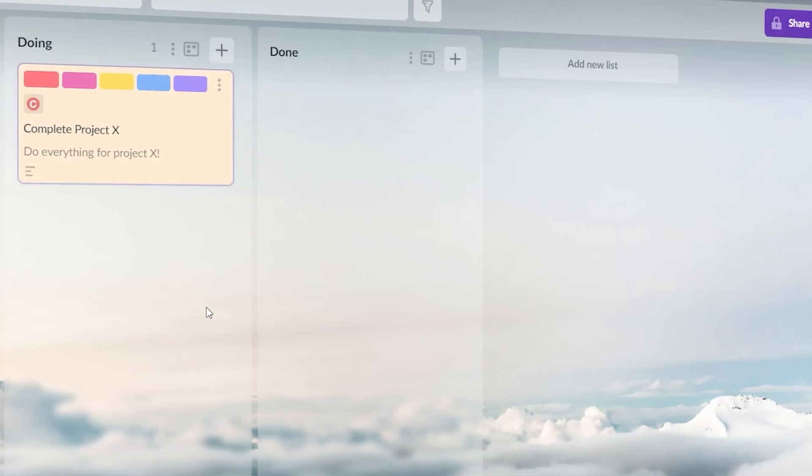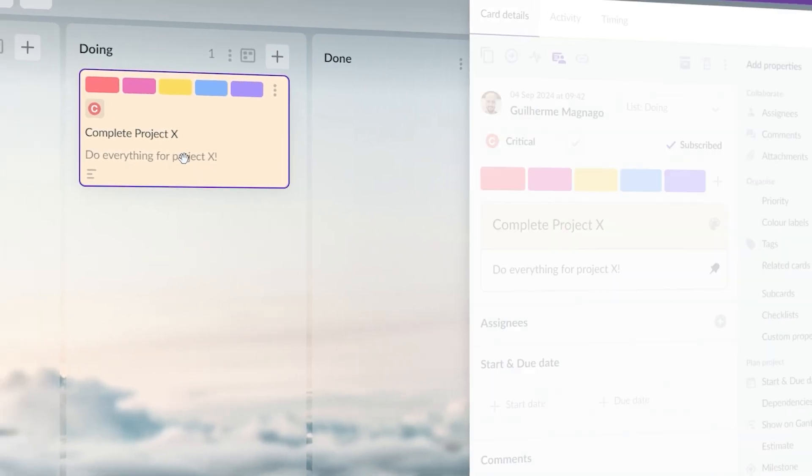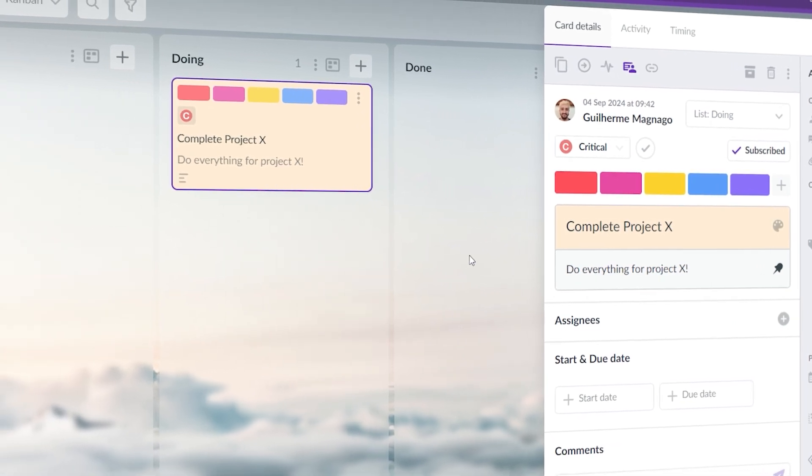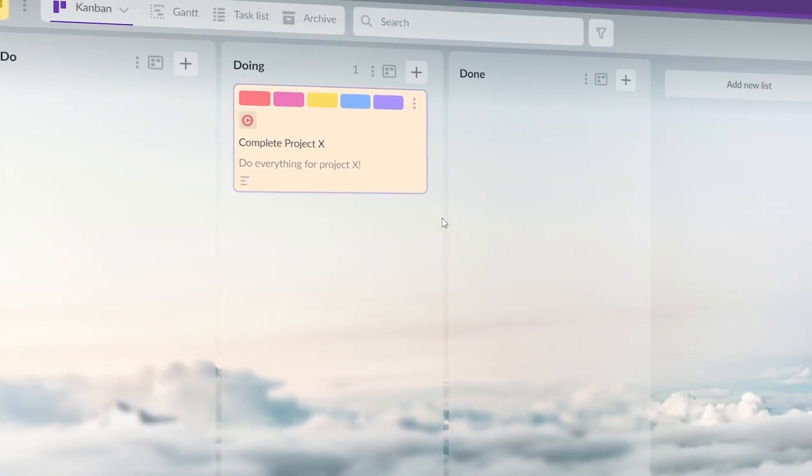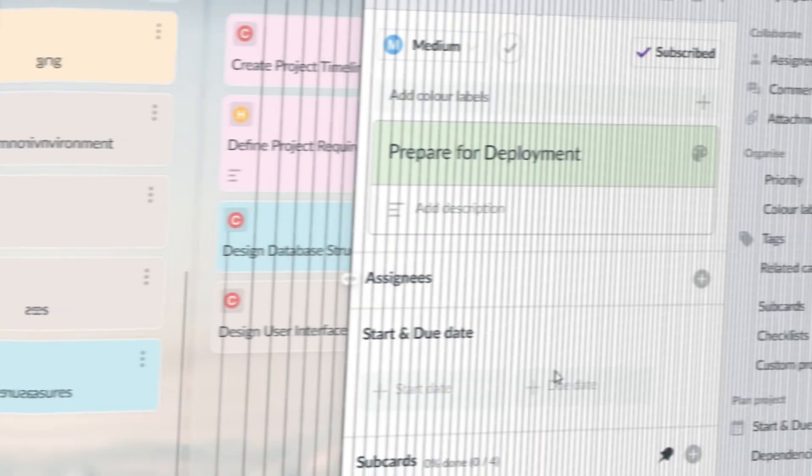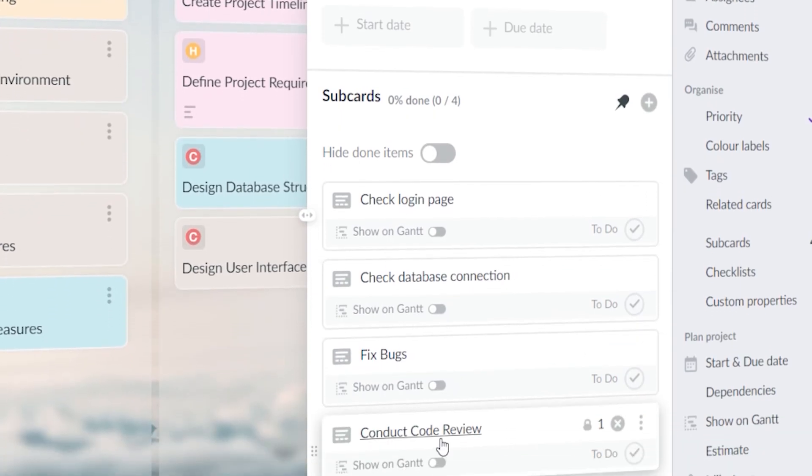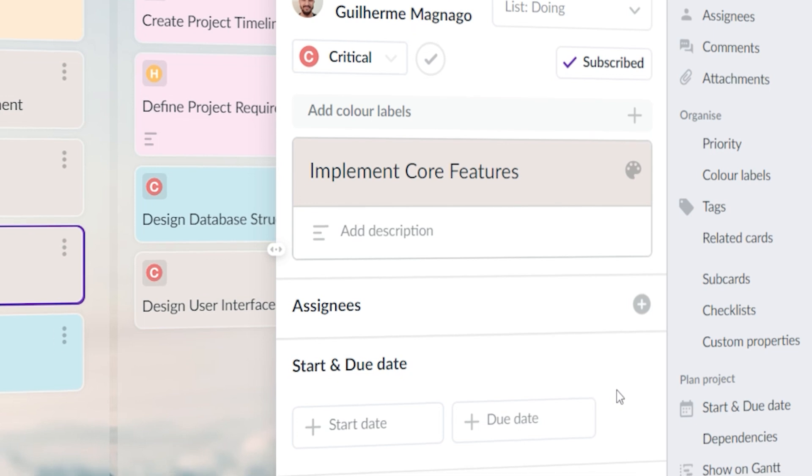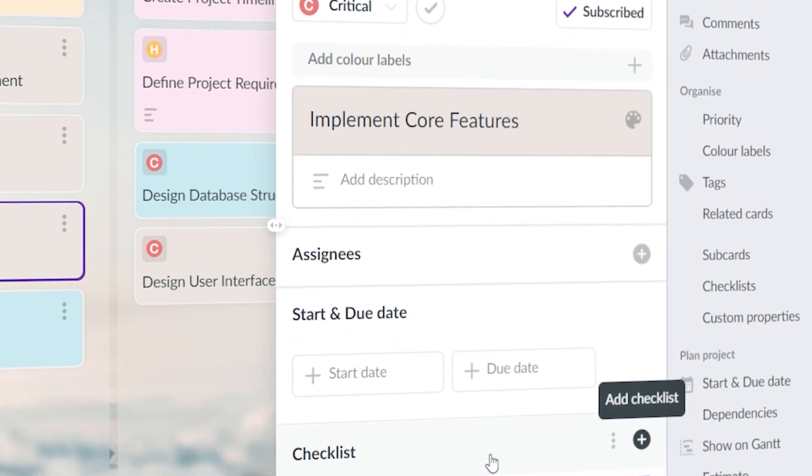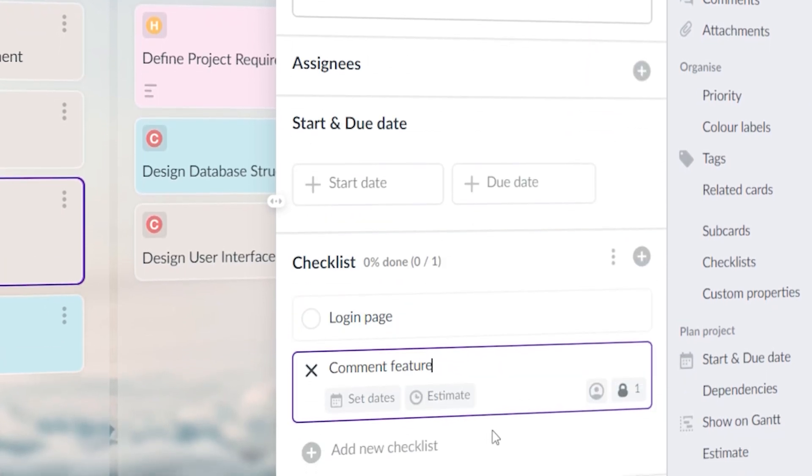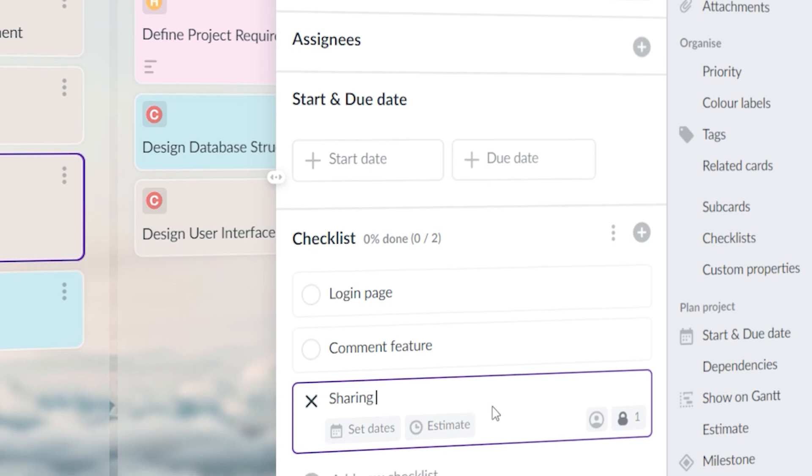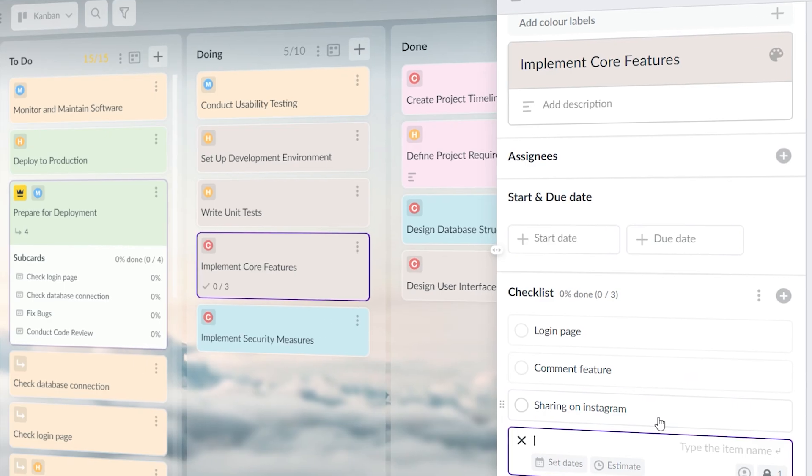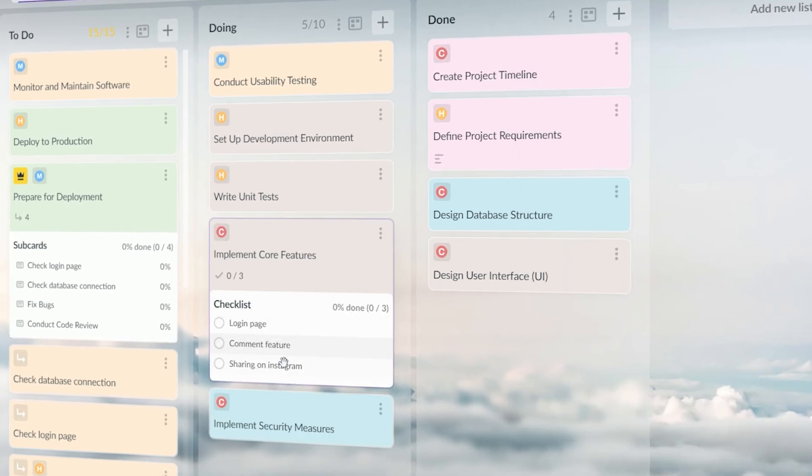I used to put entire projects as one single task on the board, thinking it would simplify things. But this just made tasks feel unmanageable and the progress slow. Now I break down large tasks into smaller, more manageable pieces. This not only makes the work feel more achievable, but also allows me to track short-term progress more accurately. If big tasks are not broken down into smaller ones, it is impossible to tell their current status.